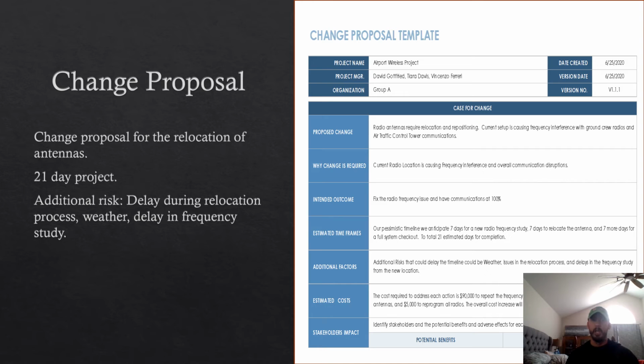We feel that this is an adequate response to the risk that came up, and the change proposal has been accepted. There are risks associated with responding to this original risk, which could delay us further. However, we are mitigating those. Those risks are a delay in the relocation altogether. We may have weather issues or delay in the frequency study once we go ahead and do that. And there we are currently building risk management plans to deal with all those additional risks that could come up for that antenna change portion.